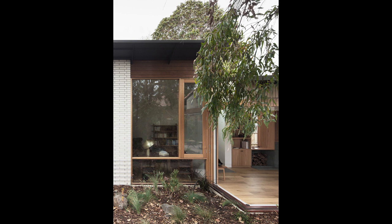So when things did eventuate with the existing house that weren't expected, and in your case, relatively minor things, just a bit of restumping and reframing of the existing roof, there was some money put aside to deal with them, and then the process could continue to move on and not become a bigger issue.